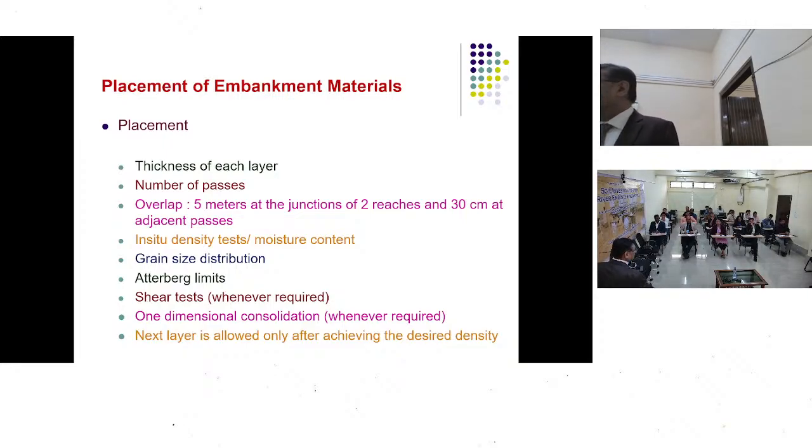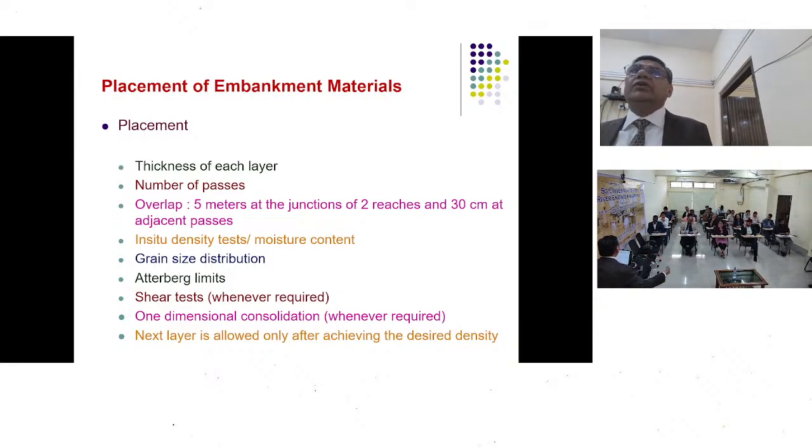A simple method is, maybe once this has been laid down, you may be using a line to demarcate it, or maybe some thread type of things to demarcate with pegs. Okay, this is my 30 centimeter, this is my 5 meters. Because removing that is again time consuming. So those are regions where the construction agency will not like to do it. So that we have to see.